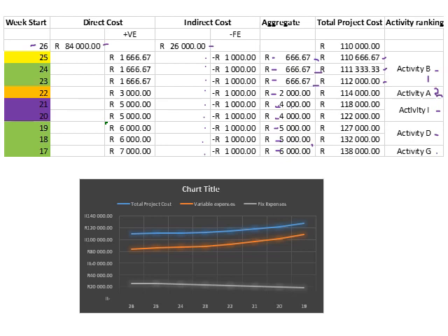So for our purposes, if you can justify where the jump is, very important how the question was structured. In this case, my interpretation was it jumped from 666 to 2,000 Rand here, so there was a significant jump here, which basically just was led by the graph as well.